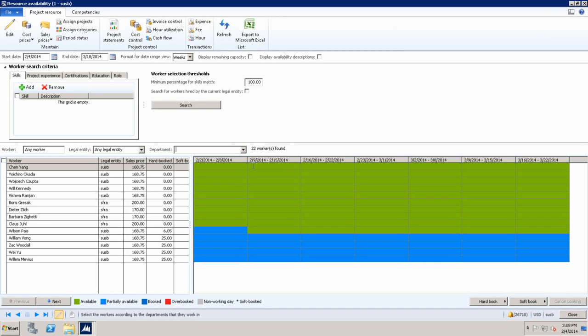So you can see, or maybe you can't, but there is a number here, which has quite some meaning to it. Basically, when it is 100%, it means it's required. All of these qualifications that I have expressed here are required. People that are returned must have all of those qualifications. So you can make calls on that. If you don't need that, you can say 0%, meaning the people that are being returned to you, the higher on the list, the more qualified they are, but they are not filtered out if they don't have that qualification. So that's a way of looking at it.